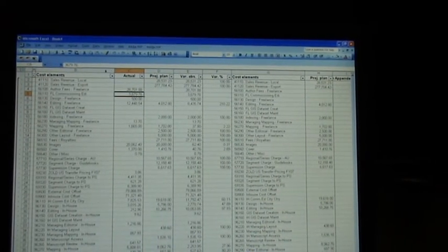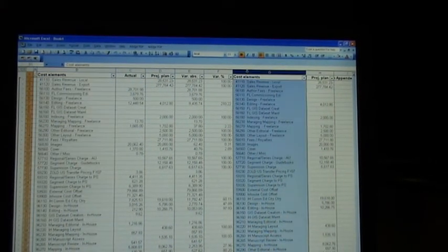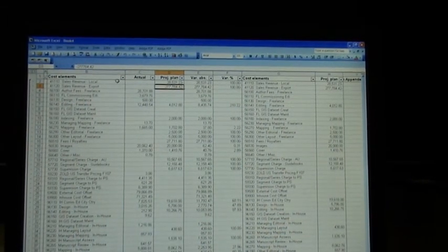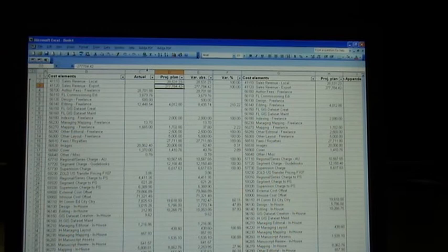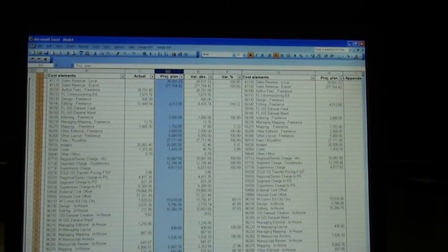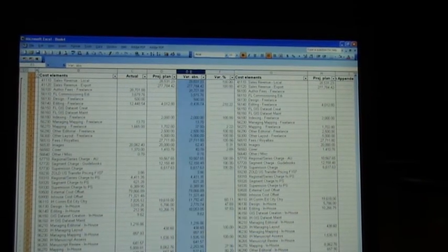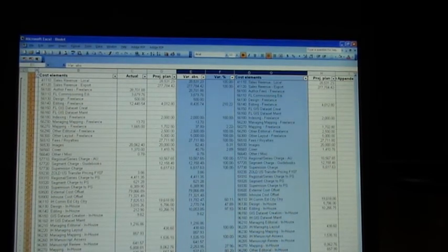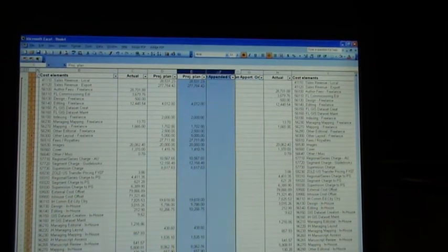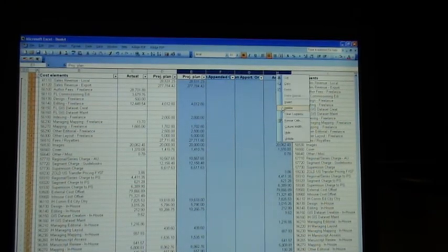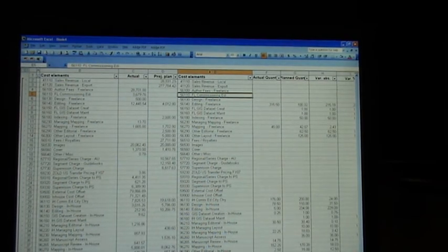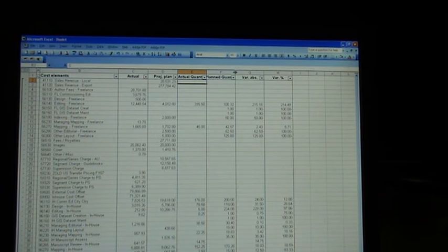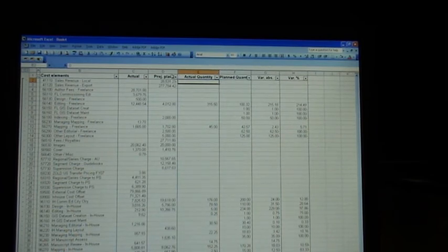The other thing you might need to do is see how it repeats this column cost element, cost element, cost element. You might want to delete some of that. So the most important things in here are actual and project plan. Actual is the cost, project plan is what was in the ACP. And there is the variance and the variance in percentage, but you can actually get rid of all that. Get rid of the cost element repetition again, delete. It repeats again this thing so you don't need days actuals, they're all the same numbers, delete again.